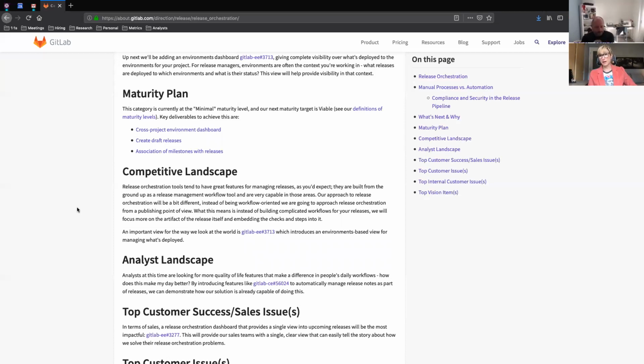There are blackout periods because there's a quarter end or a monthly end, and they want stability in the environment for that reporting and system use. Yeah, so holidays, the leading up into big changes. Companies that release once a year or twice a year will typically have a change freeze a few weeks prior to the change or after.